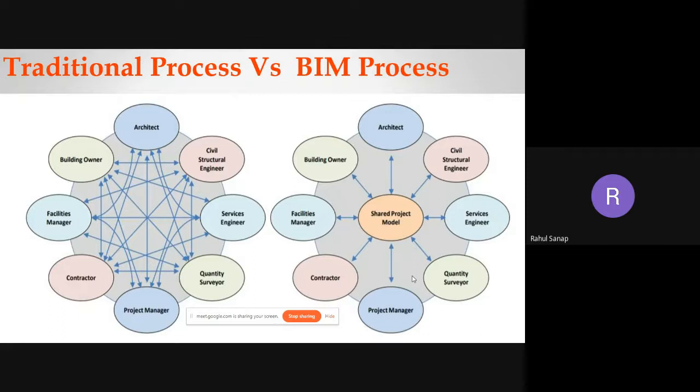Then the architect again needs to revise the drawing. Okay, in that case, what does the structural engineer do? The structural engineer will just use the issue command. He will take the issue tab and write something like, please replace the drawing or please change it. Automatically, that notification will go to the building owner and architect. Now this notification will not go to other people.